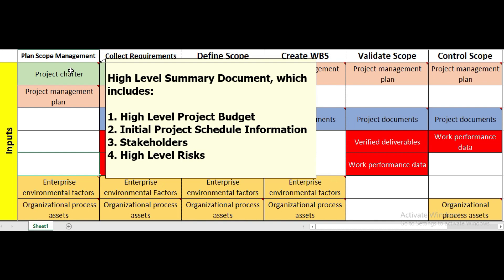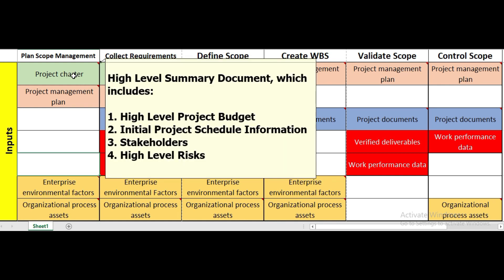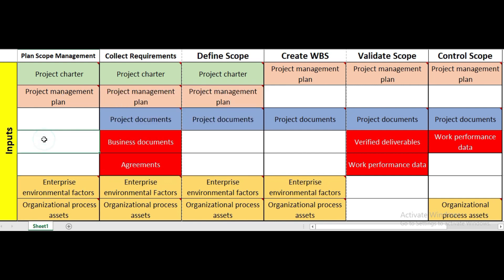The project charter includes high-level project budget, high-level information regarding the project schedule, high-level information regarding project stakeholders, and high-level risks. The project management plan defines how the project will be executed, monitored, controlled, and closed. This is a general input used across many different process areas.